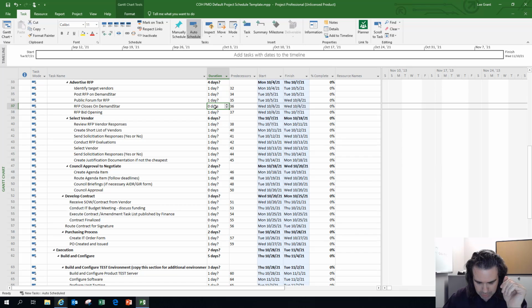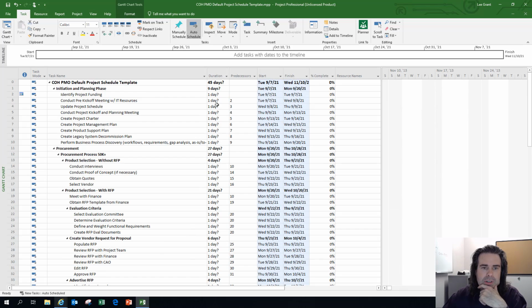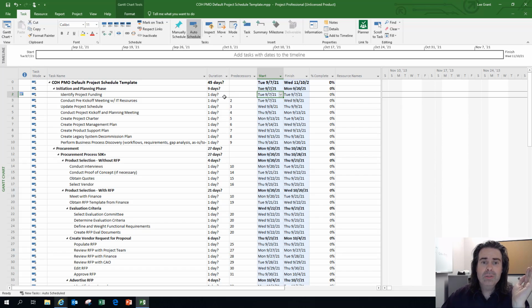And as we continue down through the directions here, just to recap, we've modified the tasks. We've specified the predecessor relationships. We changed just the first date of the first real task. The last thing you've got to do here is just change the durations to reflect what you think is more realistic. These are the default durations that Microsoft Project assigns when you create a schedule. That's why they have a question mark, so it reminds you, hey, this is not real. We just gave you a number to start this off.